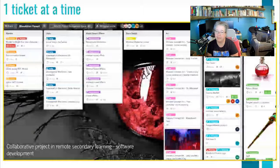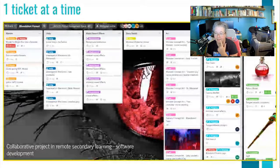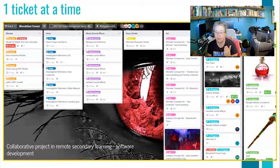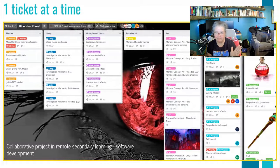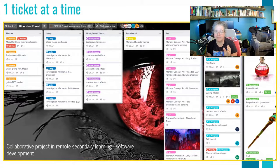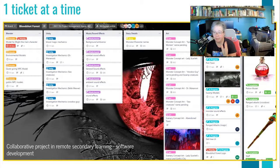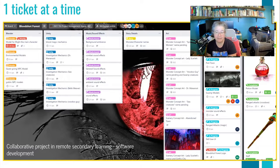Here's another example from the same software development class, where they're really in the middle of Trello. There are 14 students working on this one board at once. They divided up their boards so the entire team gets access. They've made columns based on either the software being used — Blender or Unity — or the type of process that will help their development of a software game, which might be music and sound effects, story, or art. They also have an in-progress and a completion column.